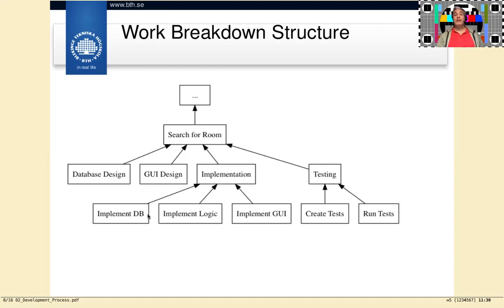See if you can find subtasks that are easier to grasp. The estimates that you make on the bottom level are, of course, summed together on the next level, and then on the next level, and the next level, and in the end you have a total sum that this is how long this project is going to take. Do it this way.